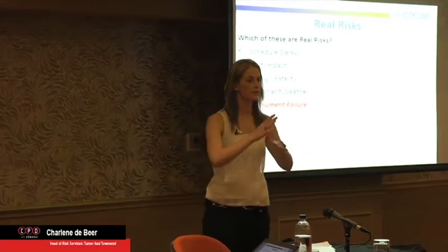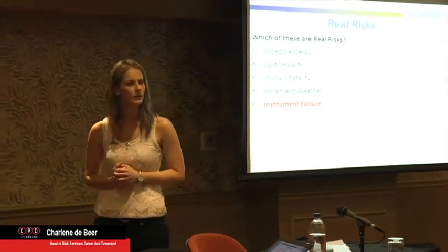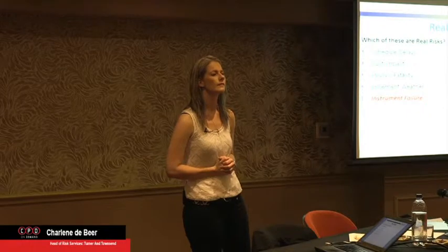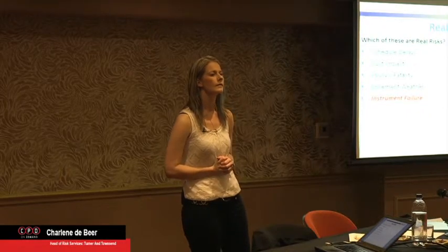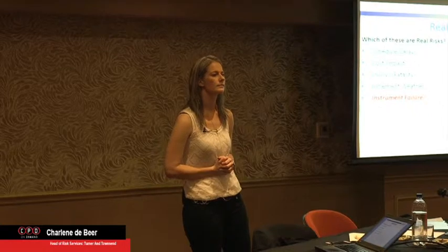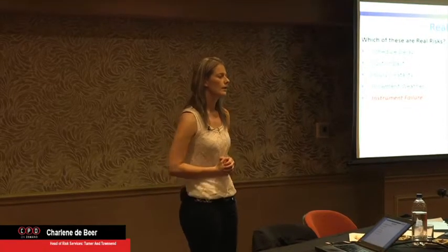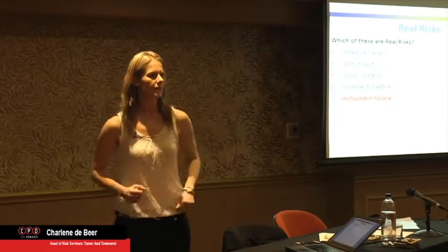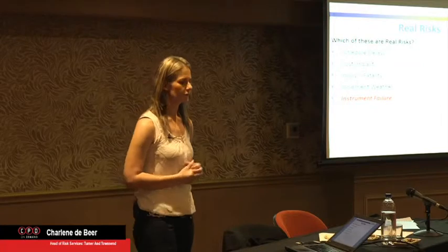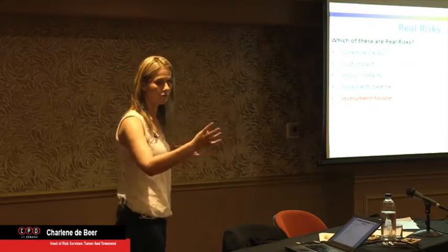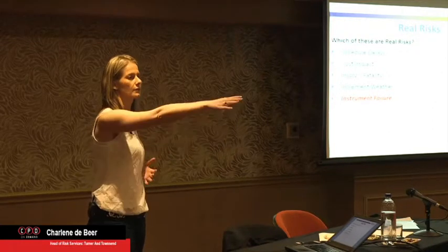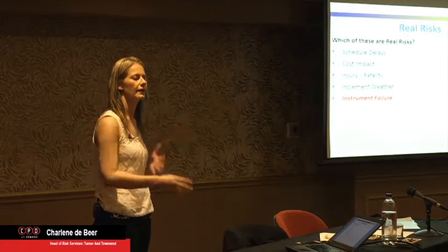I'm just asking because there's different spins on it, and I need to get your guys' input. You look at the causes, you did a root cause and said that one of the causes is bad training, and you didn't train the people better, or incompetent people, or management failure, or whatever it is. I mean, those are the causes of injury and fatality. Well, from a project risk management point of view, we would say injury and fatality as a consequence. If we don't mitigate risks and we don't look after, for example, our people, then we could kill one of them, for example, on site or in a factory shop. And you can play it either way.